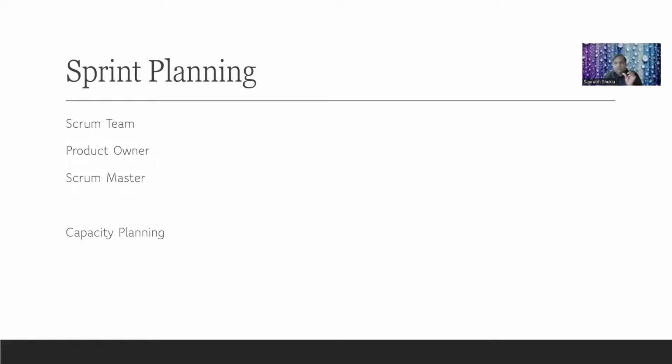Plan properly, and give the story points after asking the team. Generally the story points are 1, 3, 5, 8, 13, whatever. 13 is the biggest one, so you can say, okay, very complex problem. Maybe if you want to divide the 13 into two parts, like 5 and 8, you take the first part in this sprint and the second part in the next sprint. So sprint planning is just to make sure what we can do in this particular sprint.